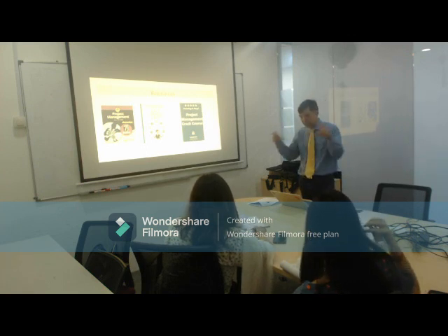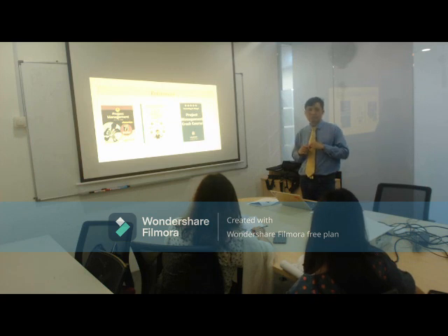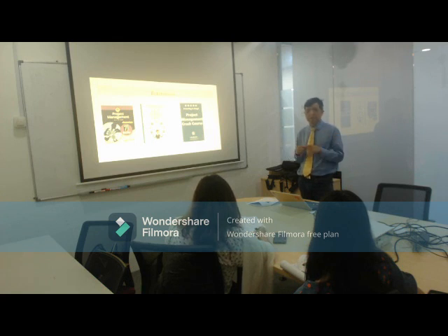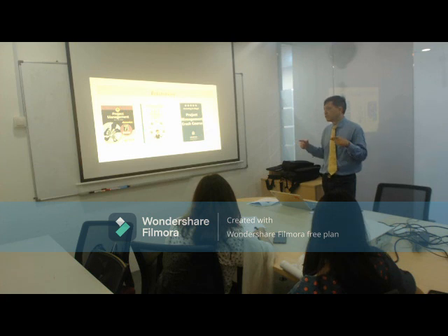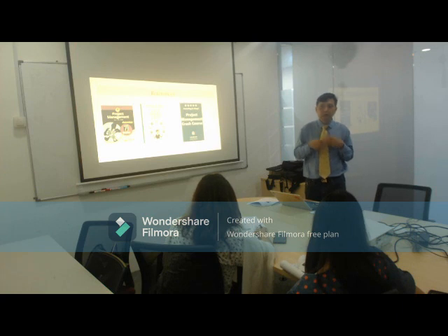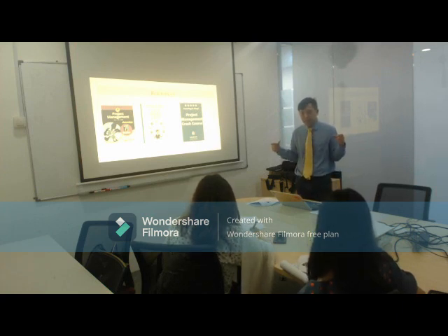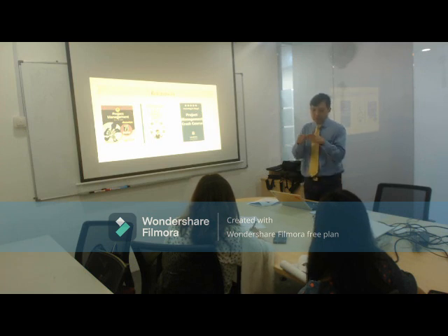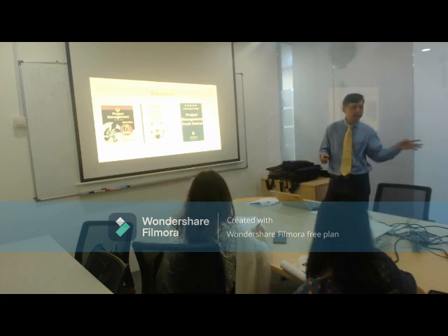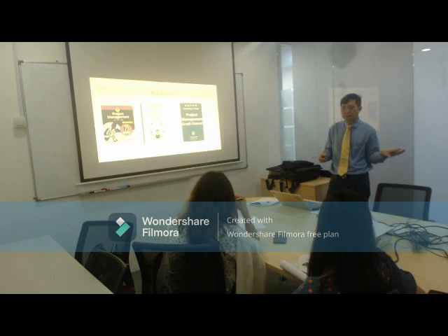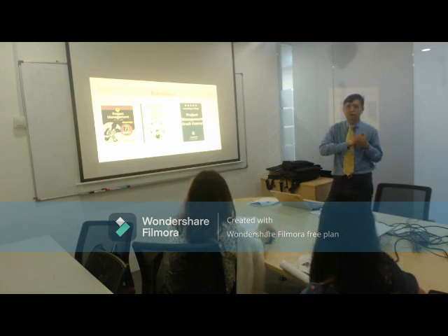Another very important one for finalize: remember, after all those things that we've done to finalize, one important thing is a document known as LL, lessons learned. Although it's not a requirement, a professional project manager will prepare that to say that this project is completed, but during this project, this is what we learned. For example, Chek is a very reliable person. You ask him to clear the things and put them back, and he will clear it off and put it back exactly as you have asked. So the lesson learned is Chek is a good mover.